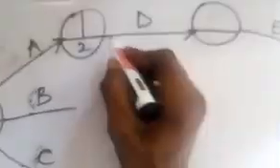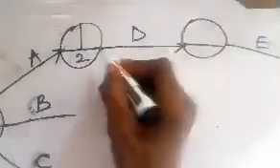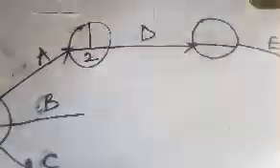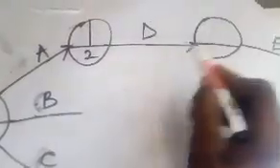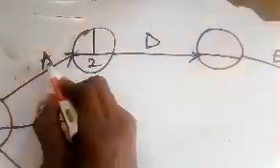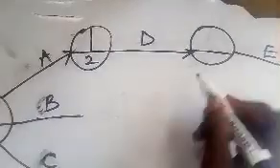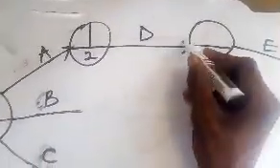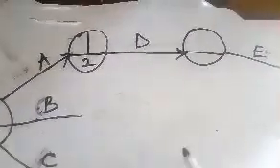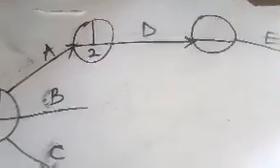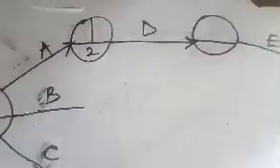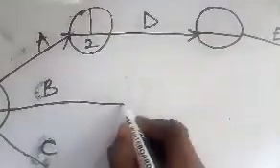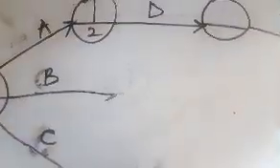What would that be? You know, this is the completion of D. This place is the completion of A. You understand? From here to here, is this node satisfied that D has completed? This place satisfied that it is the completion of A and the beginning of D. So to satisfy the question that says F starts on the completion of B and D, that is, as predecessors B and D, what do you think will happen? I'll draw my B right here. You know, there isn't much space over here. That is why I'm making it short like that.